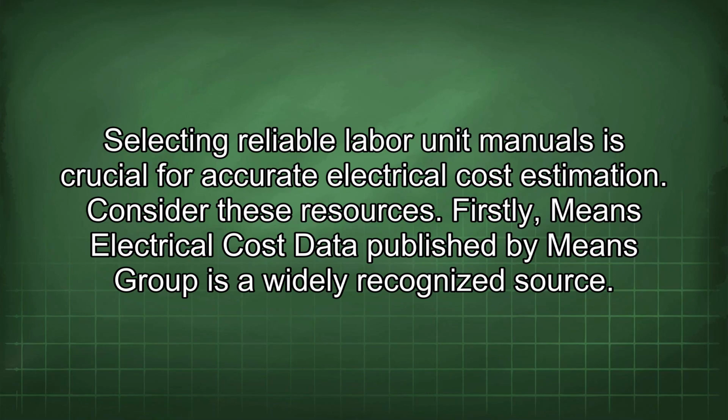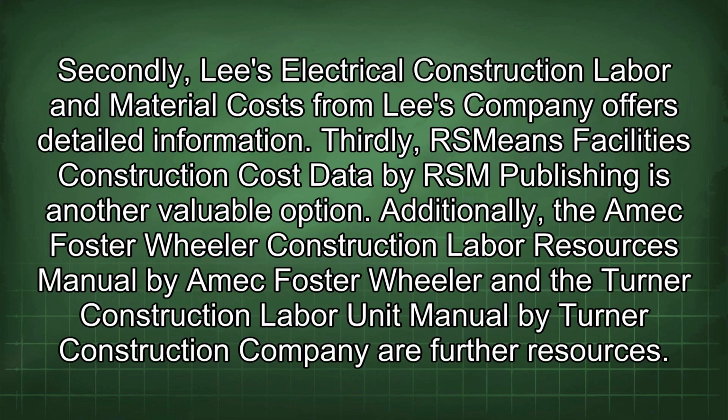Selecting reliable labor unit manuals is crucial for accurate electrical cost estimation. Consider these resources. Firstly, Means electrical cost data published by Means Group is a widely recognized source. Secondly, Lee's electrical construction labor and material costs from Lee's company offers detailed information. Thirdly, RSMeans facilities construction cost data by RSM Publishing is another valuable option.